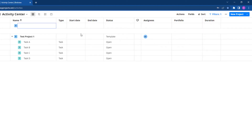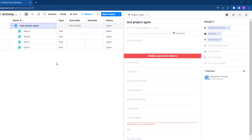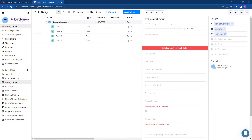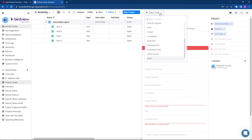This is how you pull up a project template. Once you've created a project based on an existing template, you have the option to set the status of the project to draft. This will limit your staff from receiving notifications while you plan out the project. Once the project is ready to take flight, you can update the status and this is when notifications will be sent.